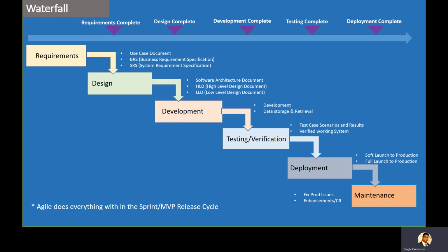When developers are done with all the development, we bring in our quality analysts for user acceptance testing, performance testing, and regression testing. All this testing and verification starts there. Depending on the size of the project, development may range between 3 months to 3 years to complete. Then comes the testing phase.